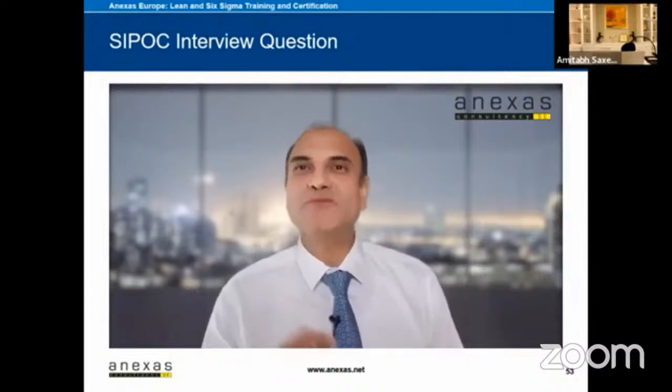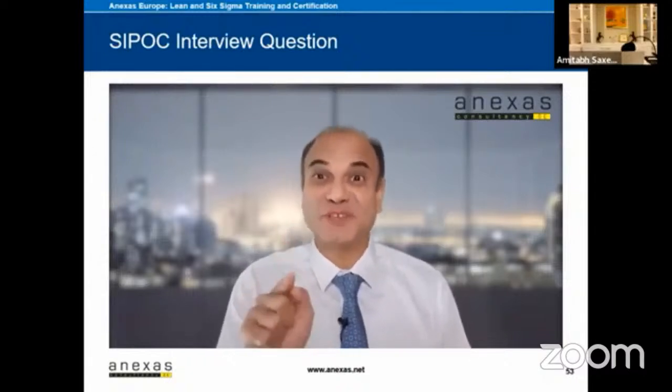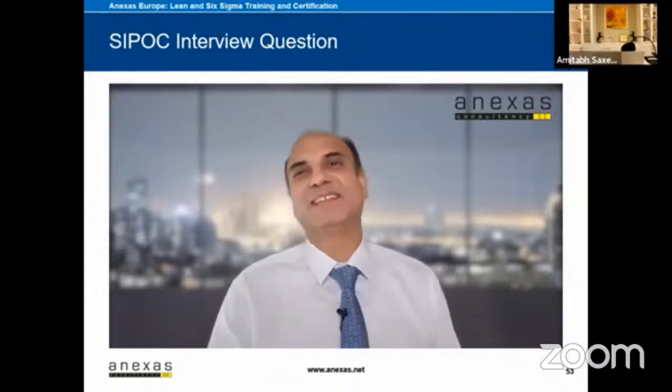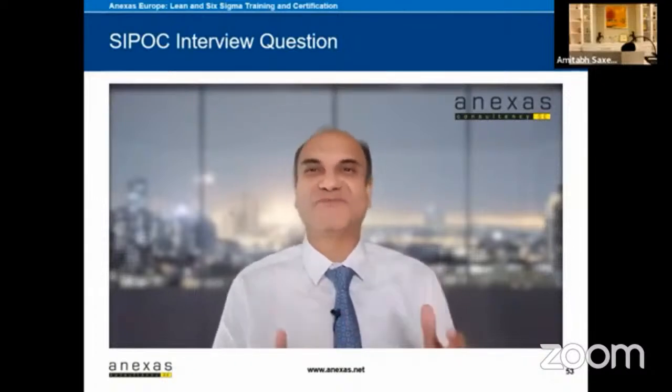It is usually done in the define phase immediately after you have written the project charter. Once we know the project, then we make a SIPOC on the process in which you are doing the project. This helps us to focus on the process rather than blaming the people for all the defects, errors, and delays.